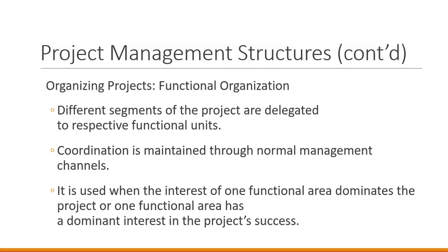This usually occurs when we don't have the necessary resources to dedicate to staffing an entire project team. So we already have a marketing department and a business office that does accounting and such, and we let each part of the project be covered by whichever area coordinates with that section of the project. The managers who already run those departments help coordinate the facilitation of the project through the channels.